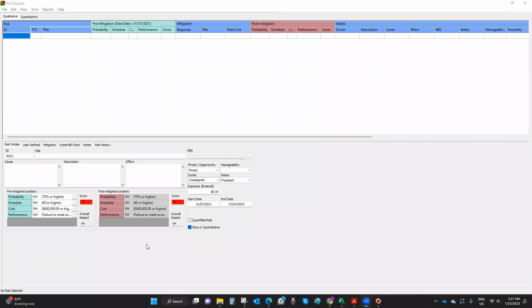Can you please give an example of opportunity in risk? Yeah, well, there are a lot of examples of opportunity. For example, if I'm working on a project plan, a great opportunity to reduce duration and costs would be using something that I've already done, like a template, to accelerate my work.